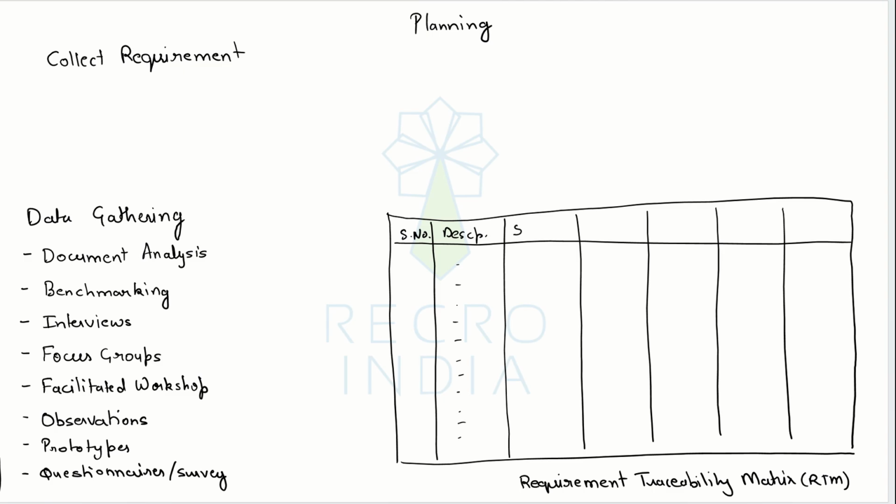Then, who's the stakeholder who requested this requirement, because at a given point of time in the project, your team might need more clarification or more information about some of these requirements. Then obviously the person who requested the requirement would be the right person to approach, and you can find that information quickly from the traceability matrix.